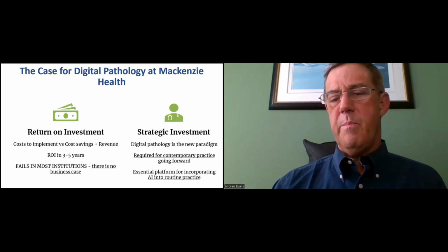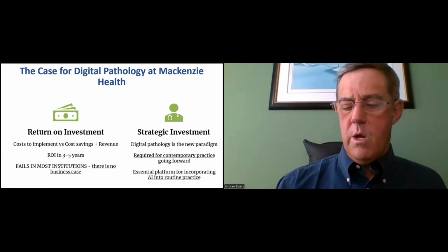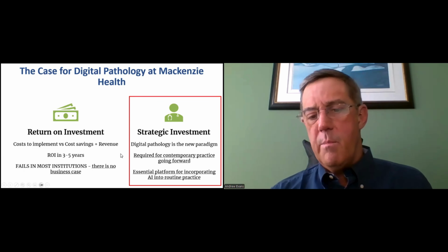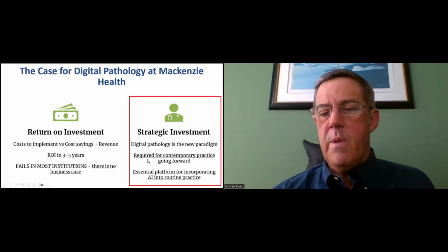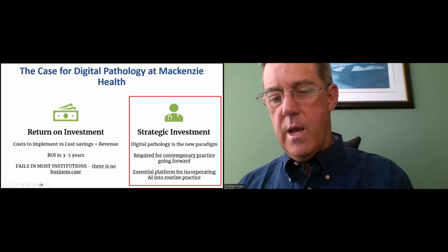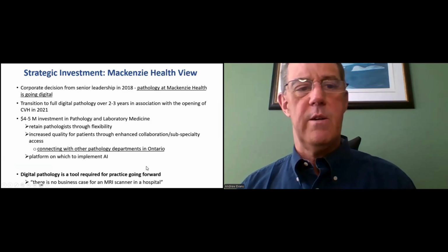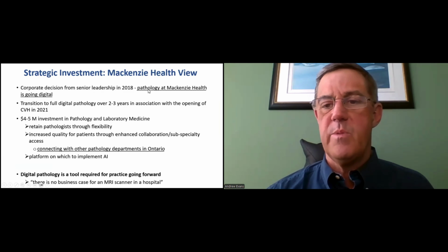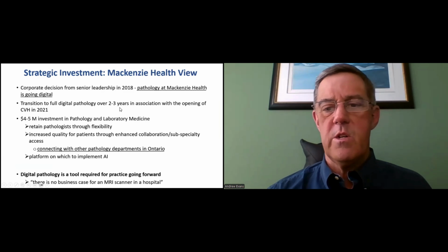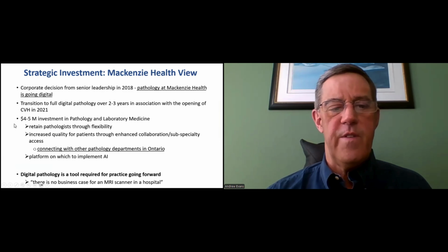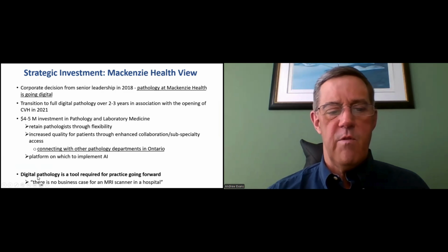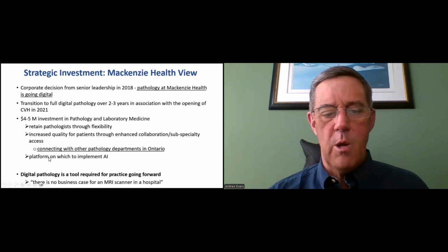Whereas the leadership at Mackenzie Health, commensurate with building a brand new hospital, decided on a strategic investment for lab medicine. So adopting the mindset that digital pathology is the new paradigm, it's required for contemporary practice, and it's an essential platform for incorporating AI machine learning into routine practice. So this was really a corporate decision from senior leadership to transition over 2 to 3 years. $4 to $5 million total in commitment was made to pathology and lab medicine for a variety of intended goals